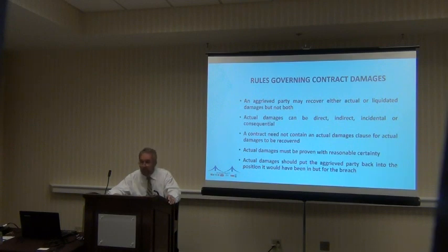So Bob, question. Yes. The LDs or actual damages are related to the prosecution of work. Right. If the contractor or subcontractor caused a fire, that could be outside of the scope of the agreement. Correct. With regards to actual consequential damages, that's unrelated to LDs, right? The fire is probably more of a property damage, or more of what I call general liability, more of a PI/PD, property damage, general liability policy coverage matter.